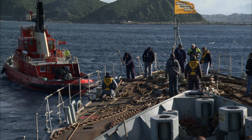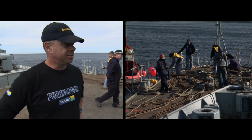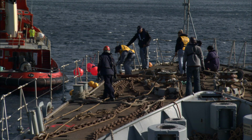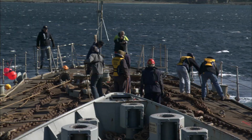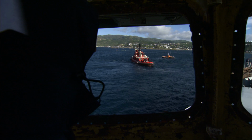We've just been really cautious. We've got a lot of weight. They've got a 7-ton anchor pulling on probably another 7 or 8 ton of chain, and it's very capable of biting fingers off really quickly. There were problems getting the anchor onto the ship, and now there are problems getting it off the ship. The 24-hour weather delay, and now this delay, is causing problems. The big tugs holding the ship in position have to leave. They have other jobs to go to.